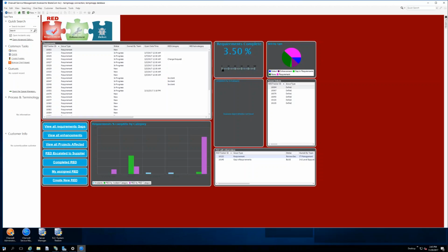maybe I said SharePoint. Our enhancement request process flow is built into Cherwell. What happens is when somebody submits a request, it goes to the approval process from the business approver, some sort of VP. They approve it, then we see a task created in our Cherwell dashboard for the relevant department that received that request. And then we take that and input it in our demand management system, which is going to be RED from now on.